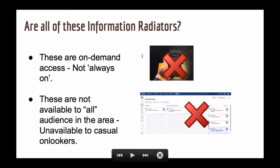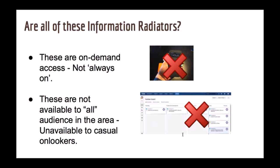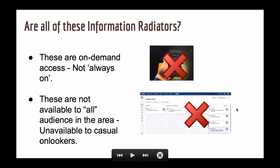If the mobile phone and the Kanban board are not information radiators, what are they? They also show information, but only when you require it — like a refrigerator at home. It stores all the food items but won't give them to you unless you open the door and pick the information. These two fall under the category of information refrigerators.